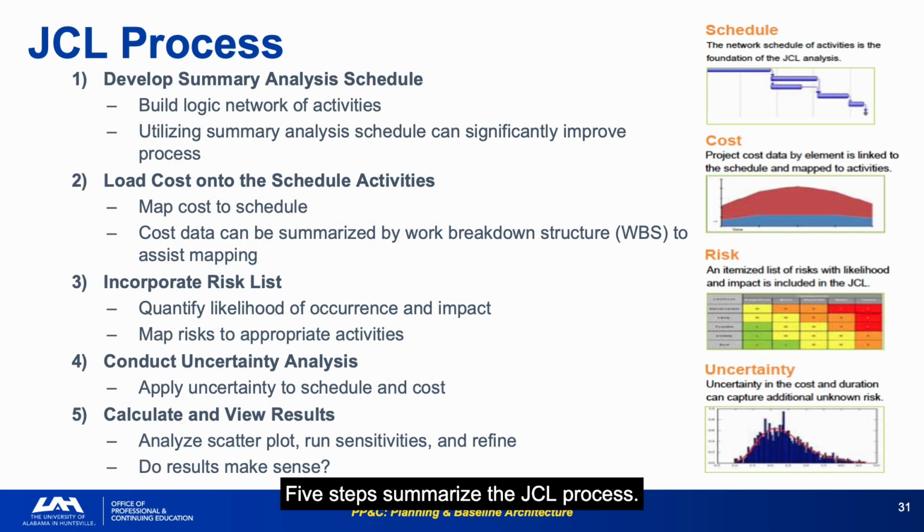5 steps summarize the JCL process. Develop a summary analysis schedule. Load cost onto schedule activities. Incorporate a risk list. Conduct uncertainty analysis. And calculate and view results.